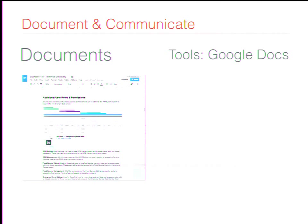Documents. I know we talked about our script being our user stories, but these documents are also part of our script. Depending on the size and nature of your project, you might deliver several other documents. The most important being the big discovery document, and then, of course, the statement of work, because if you've done all this work to plan for a big project, you're going to want to say, okay, now here's what it's going to take to build it, and here's basically the contractual agreement. In addition to these, depending on the situation, you might also do a pitch deck, risk assessment, API contracts, comparative analysis, data migration plans, any dozen of the available deliverables that you have in your workbench.